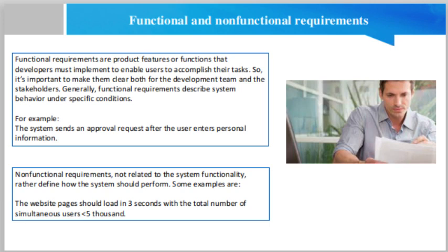User stories. A user story is a document description of a software feature seen from the end user perspective. The user story describes what exactly the user wants the system to do. In agile projects, user stories are organized in a backlog, which is an ordered list of product functions. Currently, user stories are considered to be the best format for backlog items. A typical user story is written like this: as a type of user, I want some goal so that some reason.